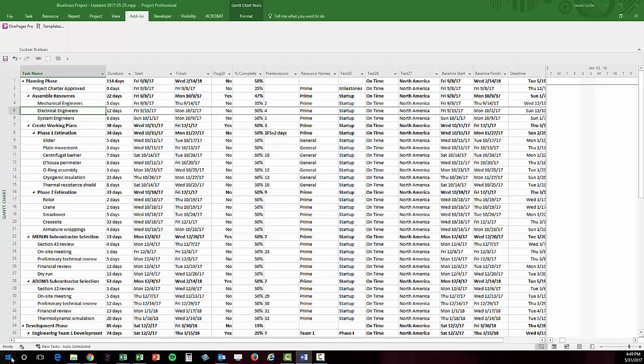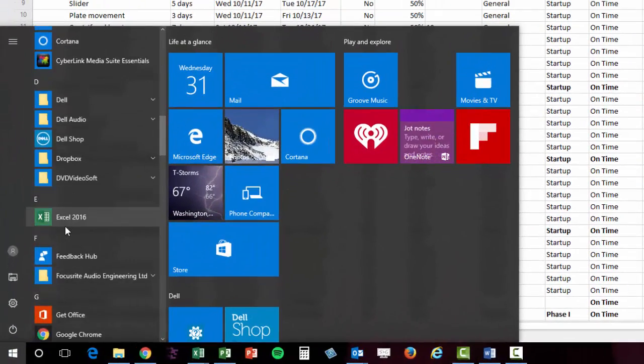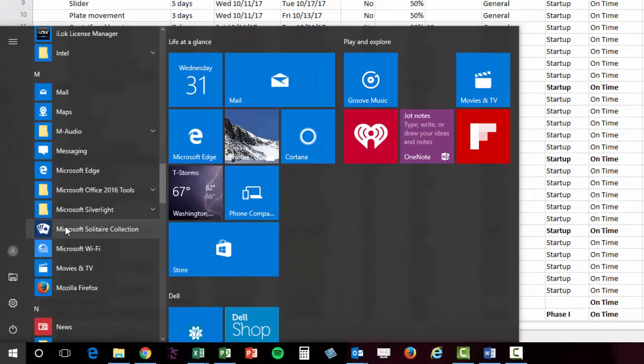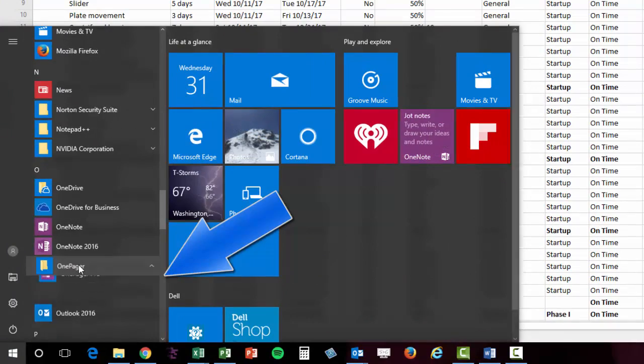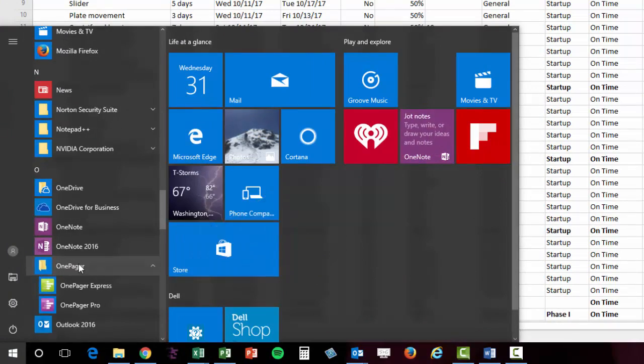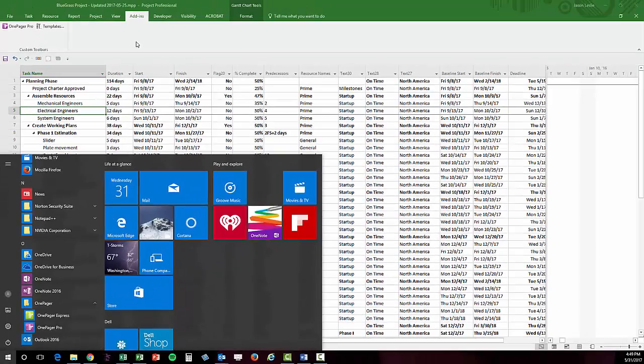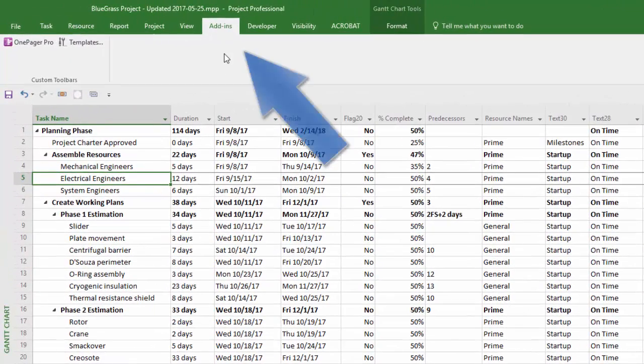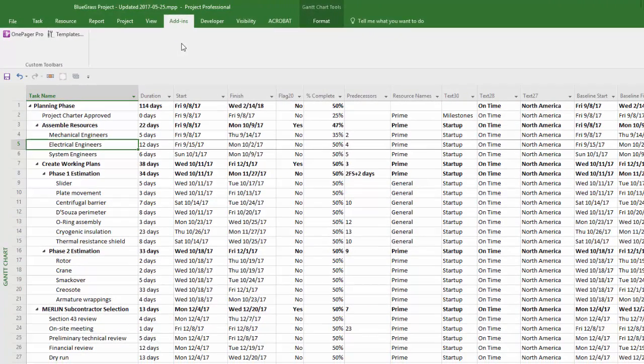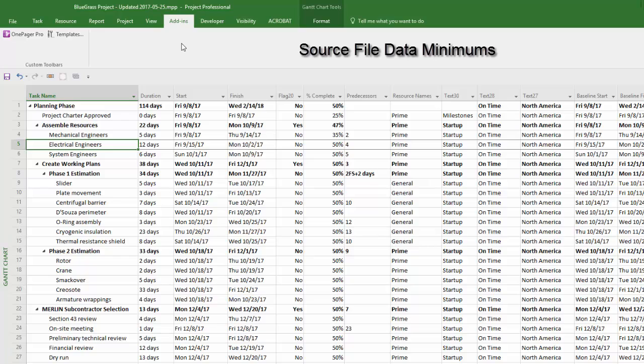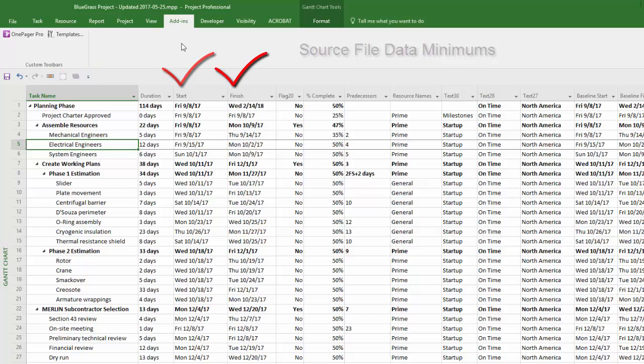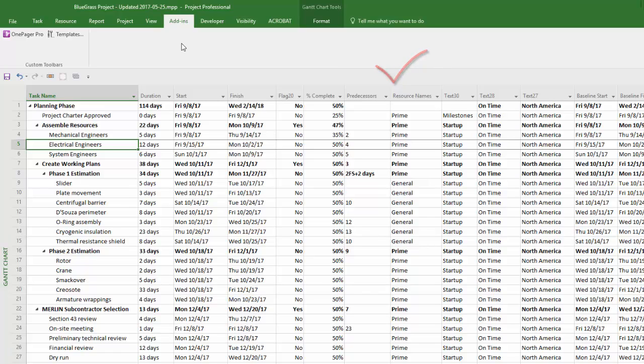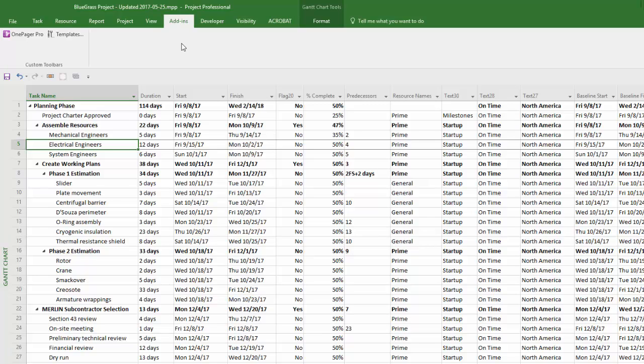Once installed, OnePager can be launched either as a standalone application or as an add-in from within Project or Excel. Your source project or Excel file at a minimum should include a task name, a start date, and a finish date. But you can also use any other columns that you may have populated. For example, you may have a column to track resource names, a column to capture status values, or maybe regional values.